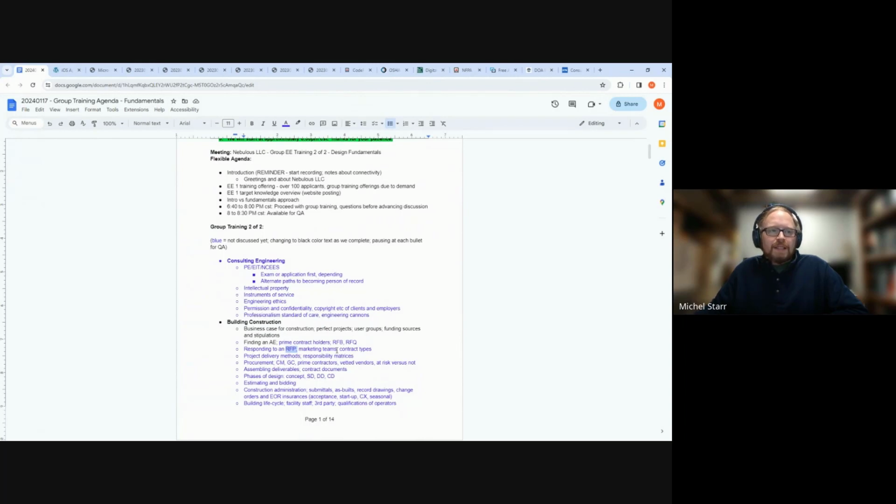But from these various mechanisms for them to solicit professional help, then they form a contract, and that contract is typically a lump sum, or time and material could be as well. So the delivery, a time and material contract would be for a smaller project, a lower dollar size project, versus a very large new construction project might just be based on the percentage or assumed percentage of what it will cost.